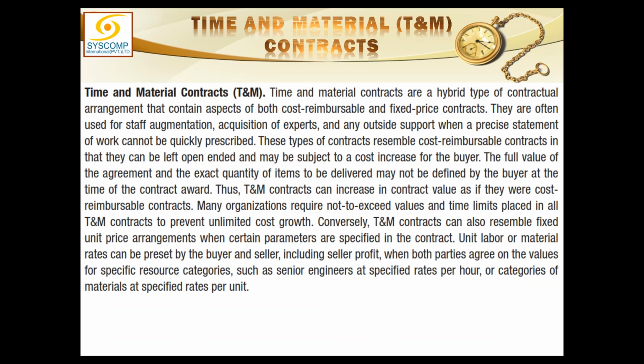Moreover, whatever the consultant is performing, all the materials to be used in that service would be provided by the buyer. So you just hire the time of the consultant, pay him on the hourly basis, and pay him for any materials if there is any usage of any material. Right?